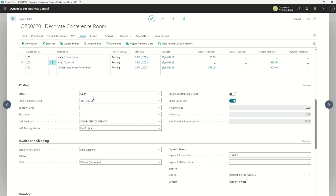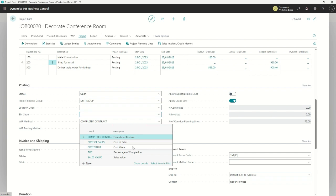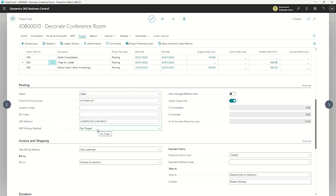Coming a bit further down, we can see — apart from the project status — how we're calculating WIP: on the completed contract, as a percentage of cost of sales, cost of value, a percentage of completion (quite a common one), or related to the sales value of the contract. And how are we going to post that work in process? We can do it per project or per project ledger entry. So at the top project level we have details about how we start posting things.